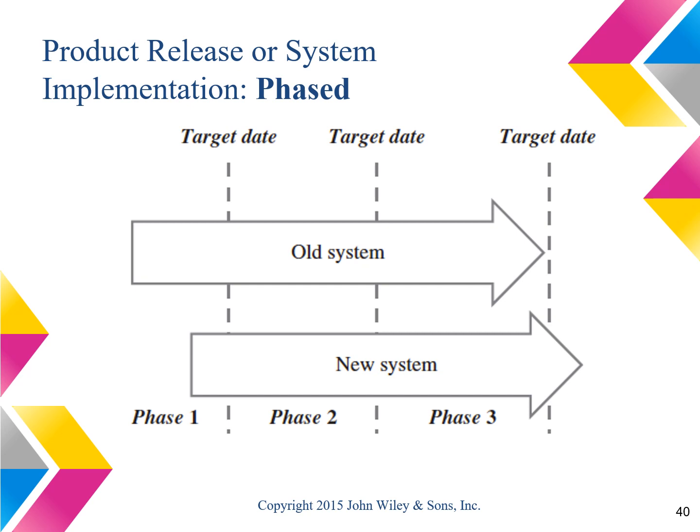So it would spread the implementation of a major system over maybe a year, year and a half, so that the implementation staff who would need to help the court staff would not get overwhelmed.